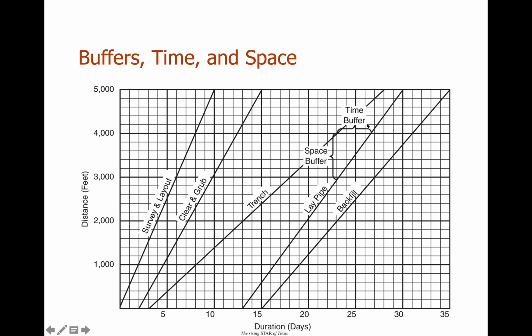And then the minimum time buffer between trench and lay pipe, well, that was decided previously in the example, so that's 2 days time. What was the maximum time buffer between lay pipe and backfill? Well, the maximum distance between each other up here is the 5 days.